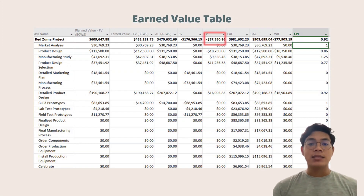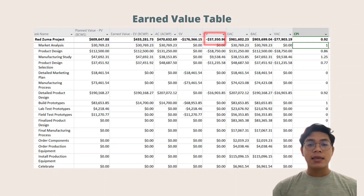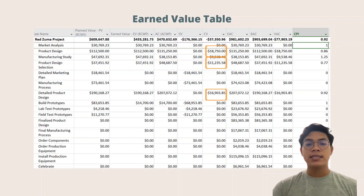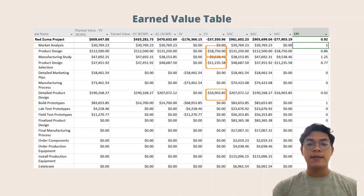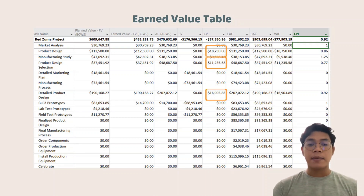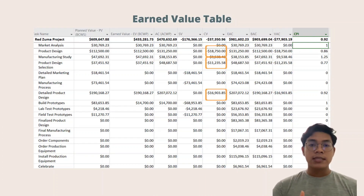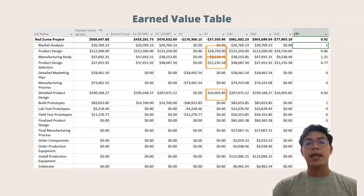From the earned value table shown on screen, the value highlighted in red is minus $37,350, indicating the Red Zuma project is over budget by that amount. The tasks over budget, highlighted in orange, are: product design at $18,050 over, the procedure for selection of product design at $11,205 over, and the procedure for detailed product design at $16,903 over.